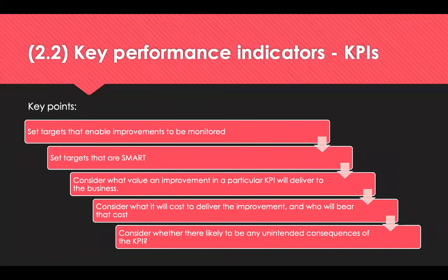Now, KPIs are included in contractual agreements to indicate levels of performance that are required for the contract. Over time, measuring performance against the KPI tells you how well that individual contract is performing. Performance can be affected by the structure of the contract itself. Contract-specific KPIs can be included to measure the buying organisation too. So, for example, the number of payments made within terms and the timeliness, accuracy and completeness of orders.